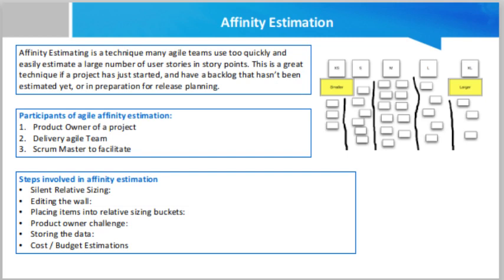Affinity estimation is a technique many agile teams use to quickly and easily estimate a large number of user stories in story points. This is a great technique if a project has just started and has a backlog that has not been estimated yet, or in preparation for release planning.